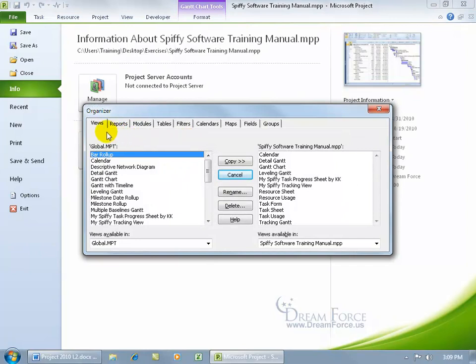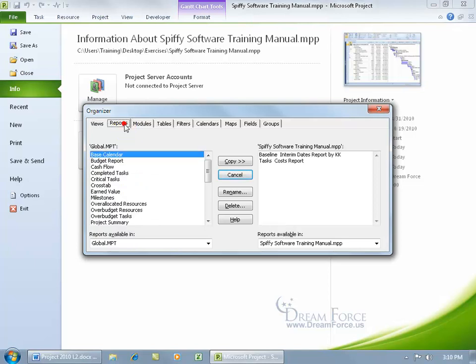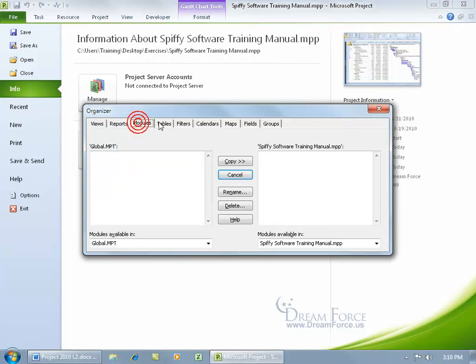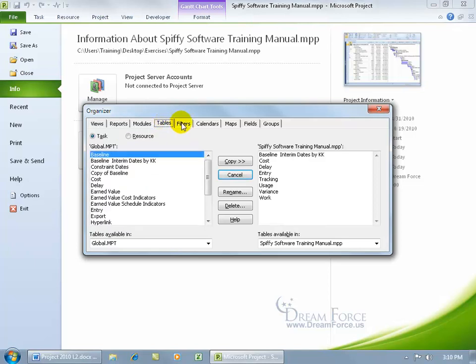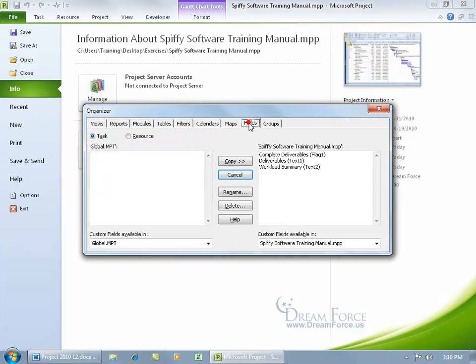You have all these different elements that you can look at and see if you have it in your main project, or if it's available in the default global template, meaning that any time you create a new project, these are what views are going to be available: reports, modules, tables, and fields.